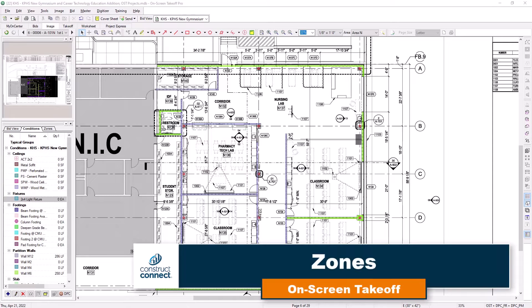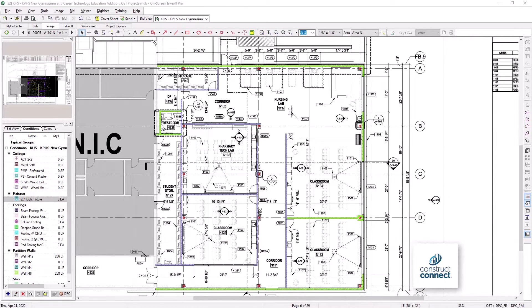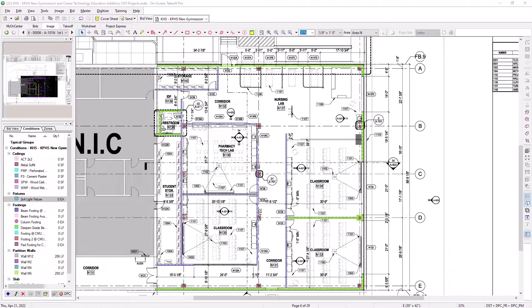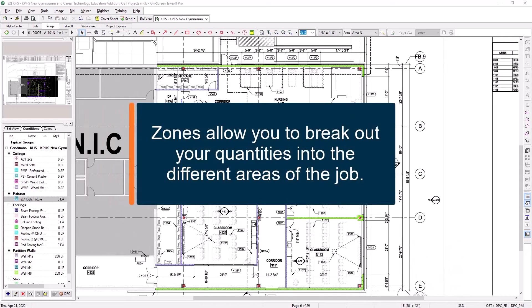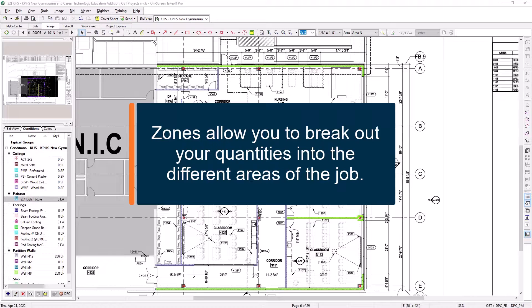You can use zones within on-screen takeoff to break out takeoff quantities into different areas, representing phases, floors, wings, pour schedules, or any other breakout that you might need.